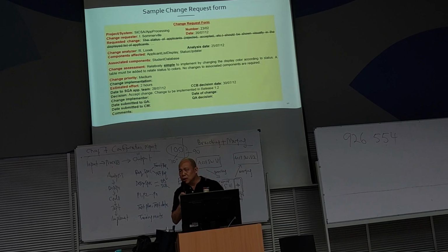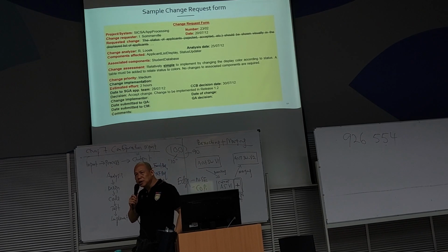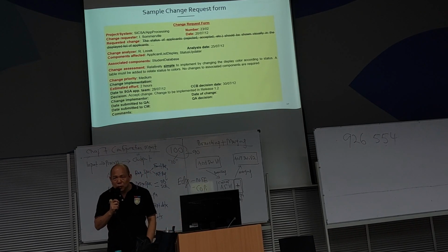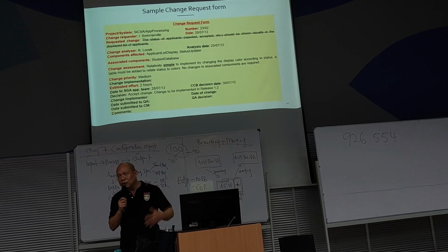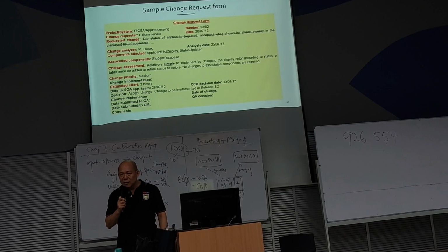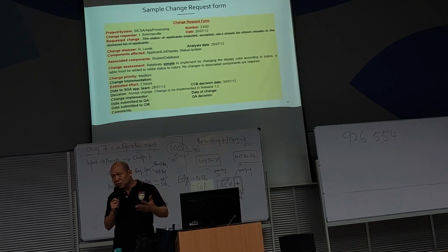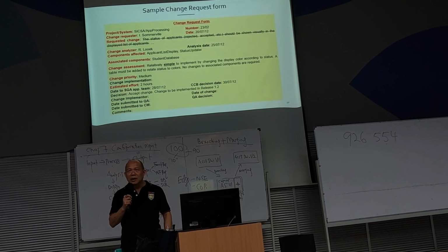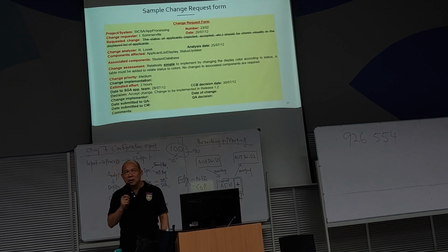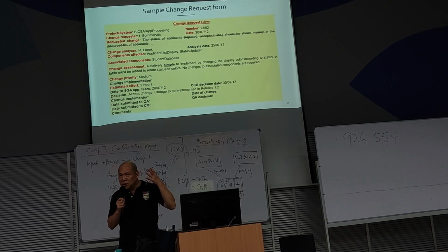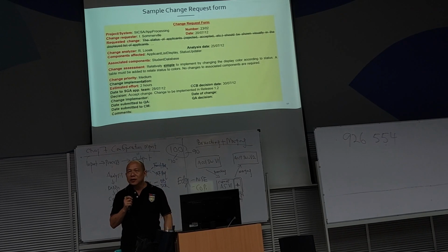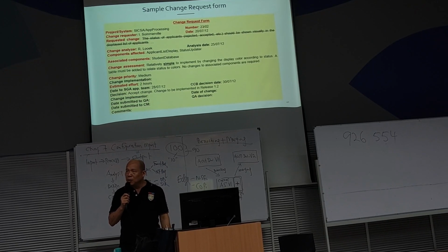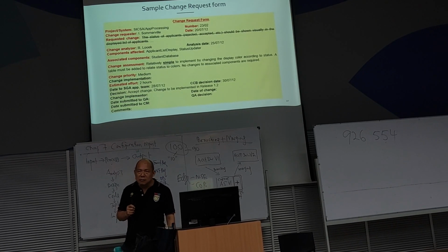Don't do things verbally when there's a change request. Fill in the form: the date you receive the request, who made the request, what is the requested change, and so on. All this must be properly recorded.